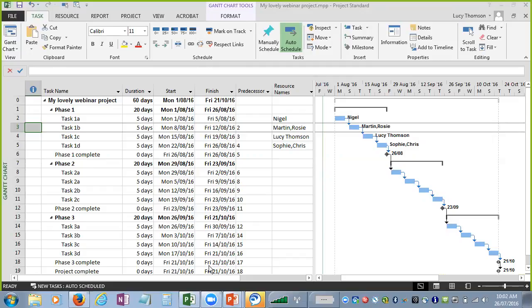So that when you get to the end of the project, you can do some analysis and report on your project as you go through it and say, yes, we're tracking well, or no, we've fallen behind, we need to re-baseline, we need to rethink. We need to throw more money or more resources at it, agree a new deadline, or de-scope. That's the scheduling triangle. You've got money or resources, you've got time, and you've got scope. If one of those changes, you need to change one of the other ones as well.